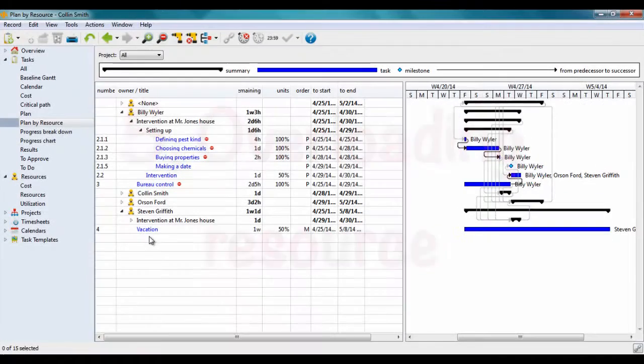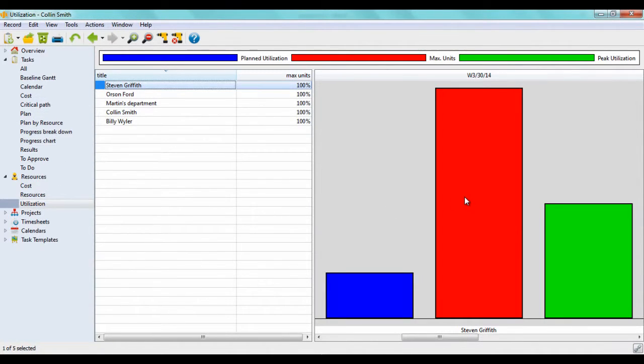While scheduling, we can easily overload a resource. This conflict can arise if a colleague is scheduled to work on 2 tasks at once at his full capacity. Utilization report shows us the use of a resource in the chosen time interval.